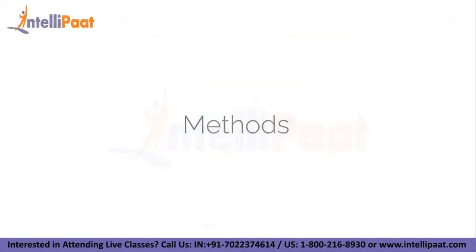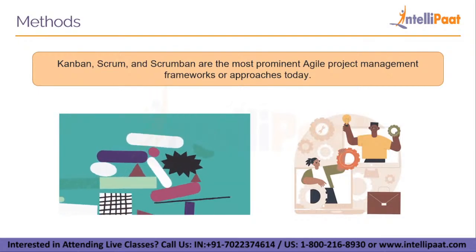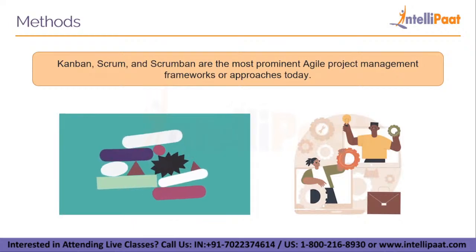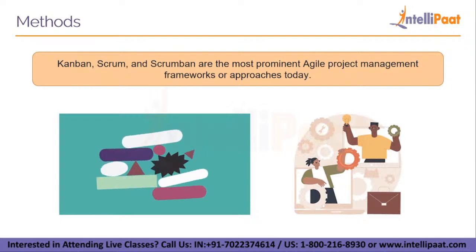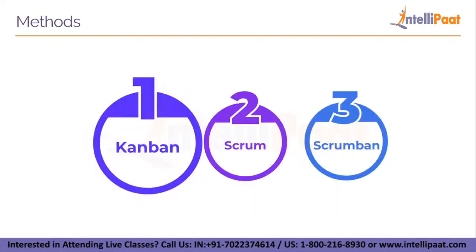Now let's move on to the methods involved. As Agile became a popular topic at the turn of the century, numerous frameworks rose to prominence, like Scrum. Many firms pursuing true business agility discovered that overly prescriptive frameworks and agility are diametrically opposed. Kanban, Scrum, and Scrumban are the most prominent Agile project management frameworks today. Kanban is a method developed over a decade ago that focuses on ongoing process improvement and evolutionary development. Its six key practices include visualizing work, limiting work in progress, managing flow, making process policies explicit, implementing feedback loops, and improving collaboratively.